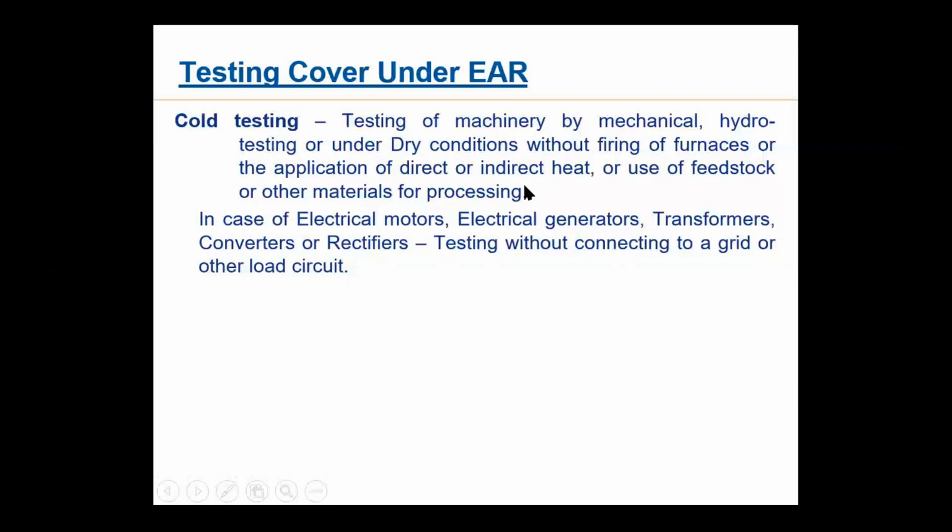No use of feedstock. If it is a petrochemical refinery or a chemical plant, no feedstock is to be inserted in the chemical reactor and all that, or other material for processing. The plant is not put into operation. Then only it is cold testing.